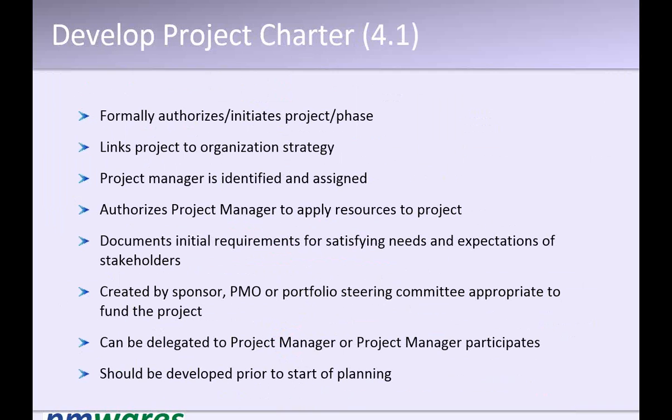So objectives, who is the project manager? If there is a restriction on authority, then the authority level of the person, high level requirements, budget of the project, high level milestone plan, any risks the sponsor or other management people have already identified, and some other inputs like how it connects to the organization strategy.